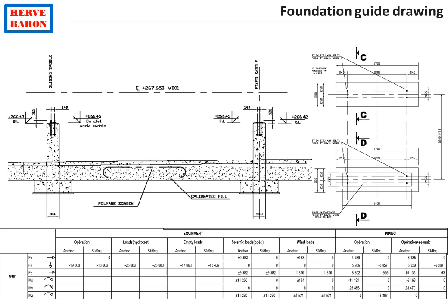In this case, the EPC contractor civil engineer stops at a guide drawing, such as the one shown here, which shows the equipment setting plan and the loads. In other words, all the input data.